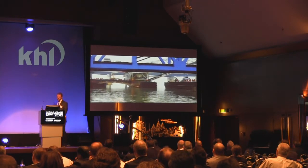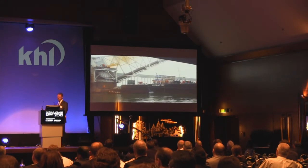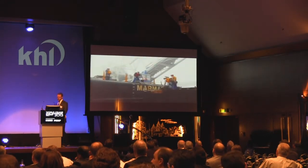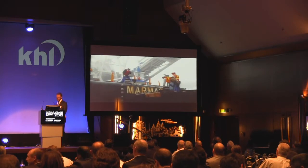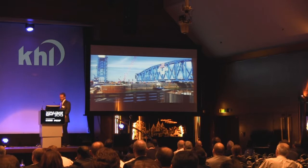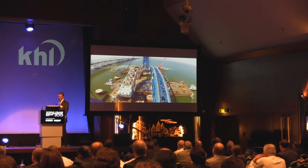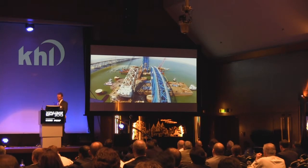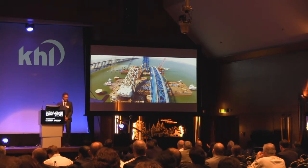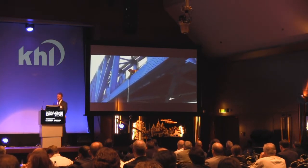On February 14th, Burkhalter began lining up the barge for the winch alignment. 20-foot chokers were located at the securement points to expedite the attachment of the mooring lines to the anchors. Making positive attachments to the securement points was critical given the extremely limited time window. The bridge was constantly monitored and trimmed by ballasting to keep it level as it approached. Utilizing the 4-point mooring system, the bridge was minutely controlled and positioned, final to prior set.